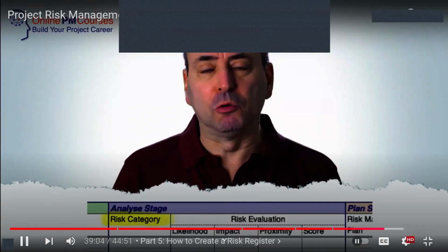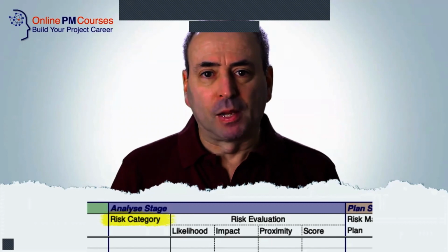Risks, technological risks, regulatory risks, environmental risks, security, safety risks. A lot of people like to characterize risks, but the question I always ask is, having categorized your risk, what will you do with that information? Will it affect anything about how you handle the risk? And if the answer is no, then nice though it may be to be able to sort your risks into categories, it may not be worth the effort of defining those categories.